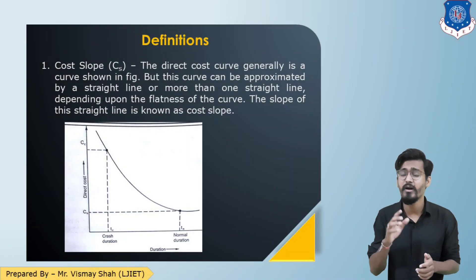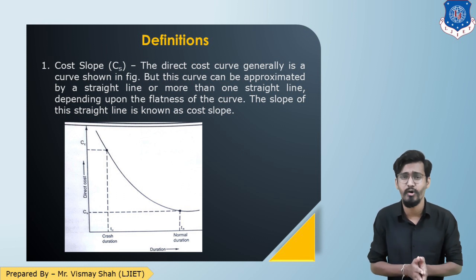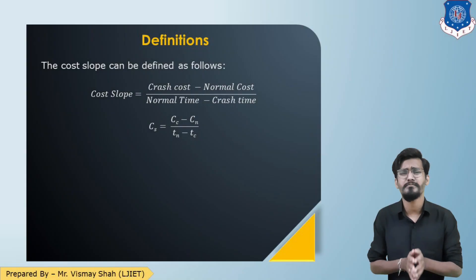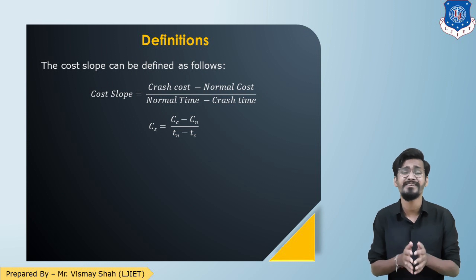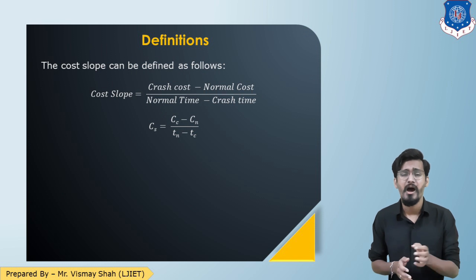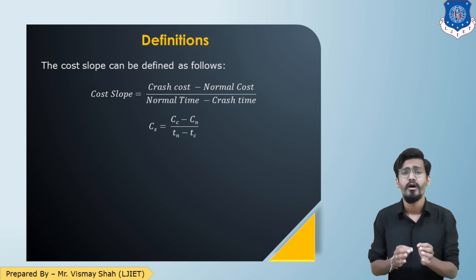This curve has a slope known as the cost slope. The formula for cost slope is: crash cost minus normal cost, divided by normal time minus crash time — that is (CC − CN) / (TN − TC). That is the formula for cost slope.